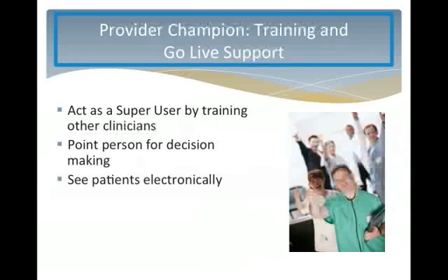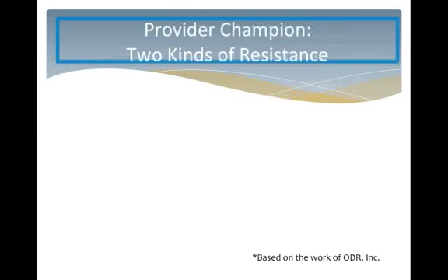Two weeks before Go Live, we scheduled simulations, meaning we would have one patient in the morning, then another in the afternoon, all on the certified complete EHR. This was great learning for us. During Go Live, I was around our main pod. People would ask me questions about how to document something, and I would take any concerns back to the implementation team. Two kinds of resistance. I'm an advocate for change.